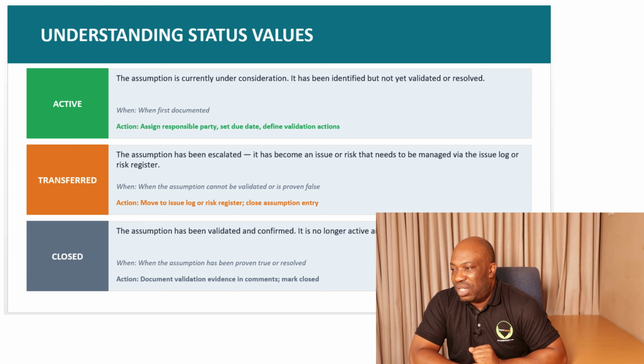Then when it's closed, the assumption has been validated and confirmed. It is no longer active and no further action is required. So when the assumption has been proven true or resolved, then you close it. You document the validation evidence in comments and mark it as closed.